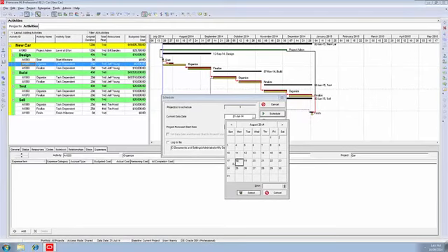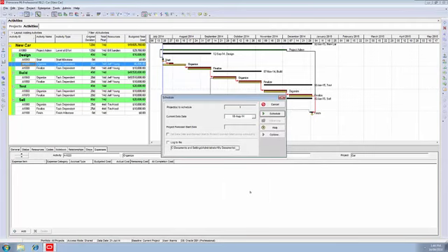Remember, the data date represents the beginning of a working day, so it's not taking any of this Monday the 18th into account. It's doing everything up to the end of Friday the 15th, assuming that we don't work weekends. So it's capturing everything to the end of Friday the 15th. Traditionally, if you start your working week on a Monday, you would put the next Monday as the appropriate new data date. So we select that, 18th of August, and we're now ready to schedule.